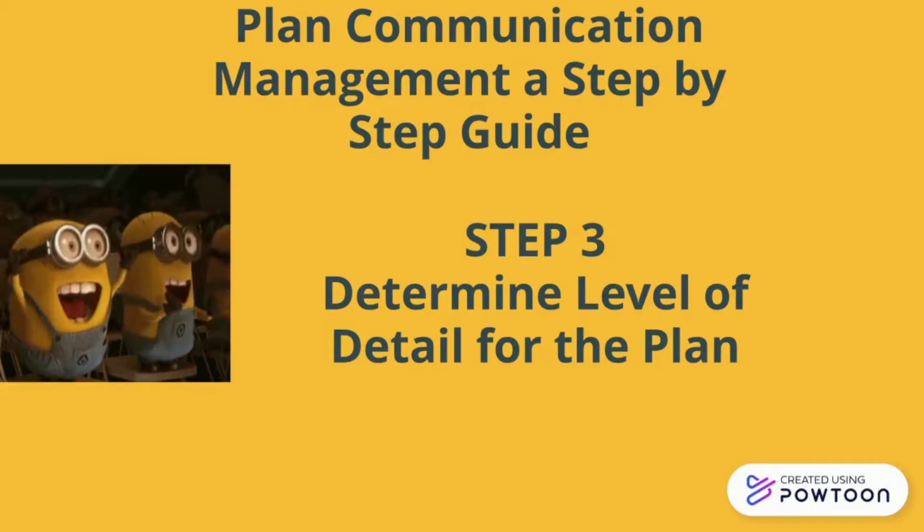Size of project. Larger projects which span a longer time frame tend to have more communication requirements. Complexity of organization. For instance, a highly political environment within the organization has very specific communication needs for the project to be successful. Number and location of stakeholders. Projects with a high number of stakeholders and/or stakeholders from a wide geographic area may require more detailed planning of communication management.